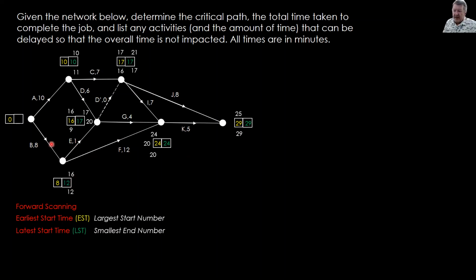Let's back up the front, back up to the start vertex. We're at 12, take away 8 is 4. 10 take away 10, that gives us our 0, which is back to the start.